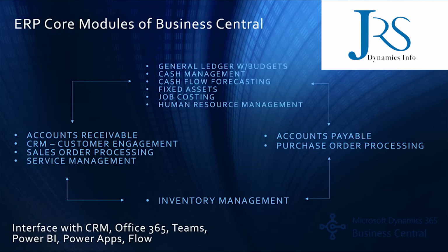Power BI, Power Apps, and the Microsoft Flow products are fairly new additions to the Microsoft software offering, and they essentially offer you integration, reporting, data analysis between the ERP system and other Microsoft systems. For example, one of the things you could easily configure is an event, let's say in job costing, going over budget, triggering an email through Office 365 for one of your team members to follow up on a particular job that is currently in trouble.